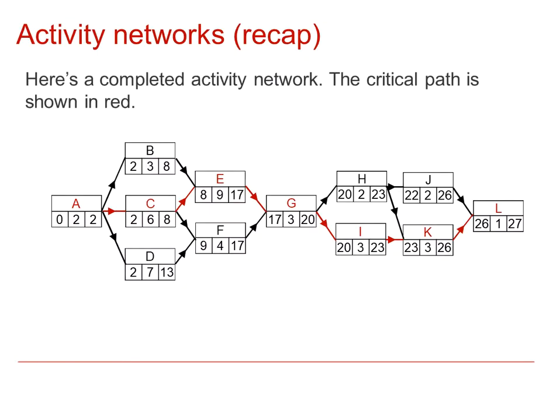Well, you've seen in previous videos how we can construct an activity network, firstly from a precedence table and then by doing what's called a forward path and a reverse path to work out the early time of an activity starting and the latest time it can finish. So for example in D we can see its early time is 2 and latest time it was finished 13. Once we've got the activity network, we can then find what's called the critical path, which is shown here in red.